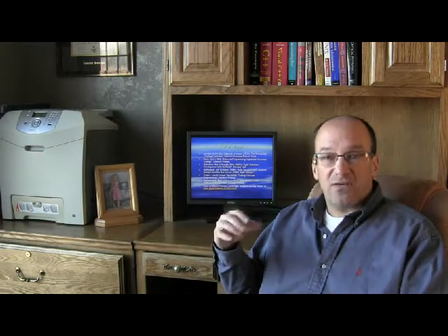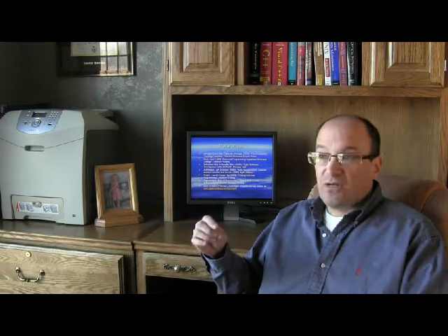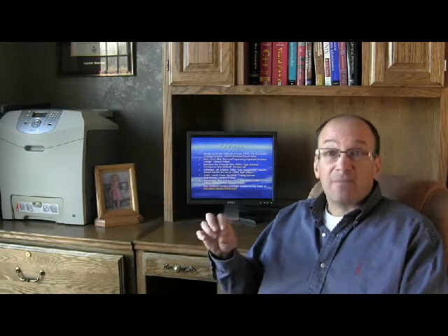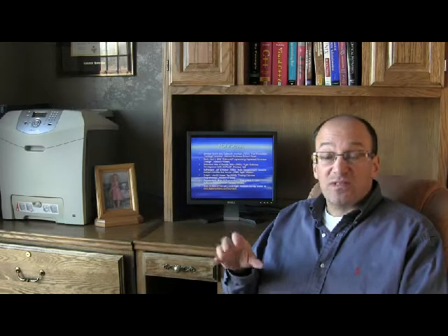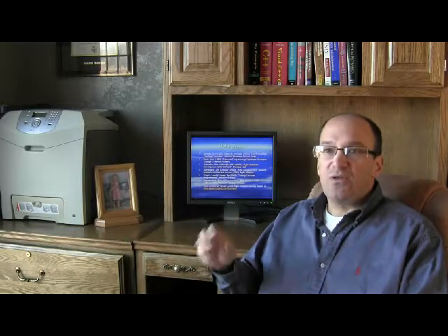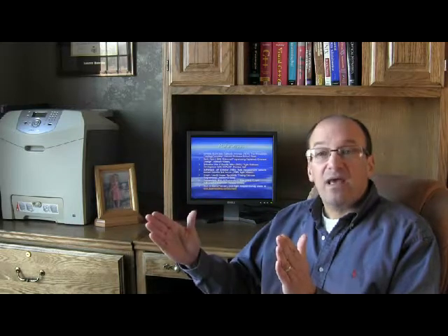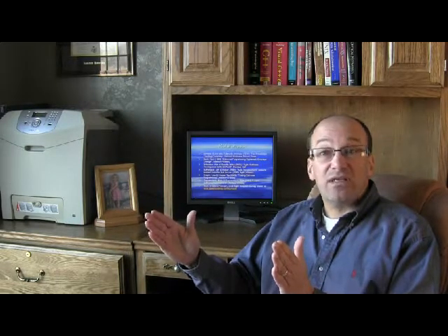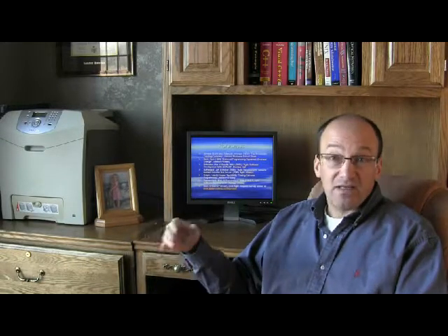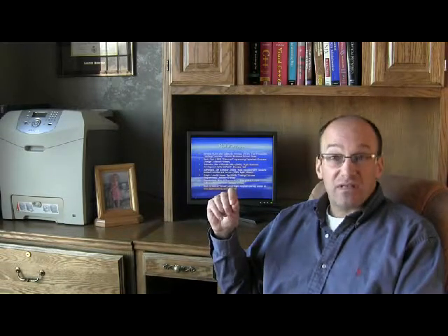Another issue we had was a lot of our functionality was on an enterprise scale. We needed to work with the database, internet service providers, and the operating system. And typically these pieces would take months to develop. We used an Agile concept called a tracer bullet, which used a thin sliver of functionality that we built upon in later sprints. And we're able to still demonstrate and deliver working code after each sprint and build upon it in subsequent sprints.